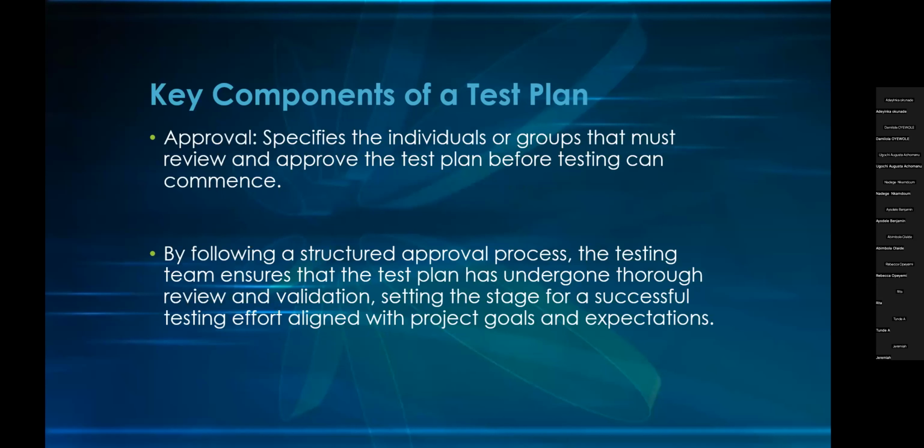So the last one is the approver, which specifies the individuals or group that must review and approve the test plan before testing can commence. So when the test plan is created, it needs to be approved. The stakeholders, your test lead, test manager, even the development team should all approve of what is in the test plan.